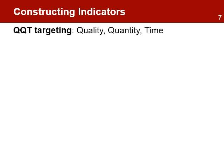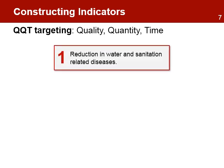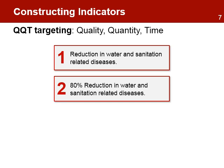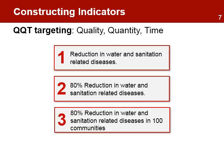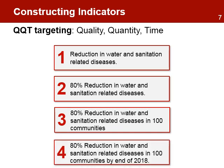The process to construct indicators: indicators should be measurable in terms of quality, quantity, and time. This is called QQT targeting and consists of four simple steps. It starts with a basic indicator sentence like 'reduction in water and sanitation related diseases.' Then we add quality: 'reduction by 80%.' Then we add quantity: 'in 100 communities.' And finally, we add time: 'by the year 2018.'